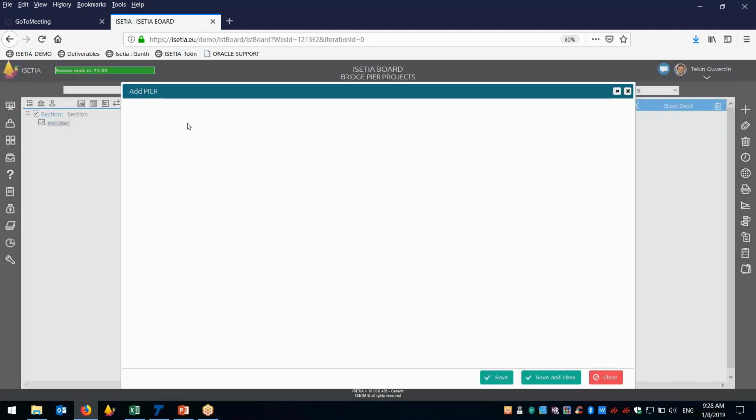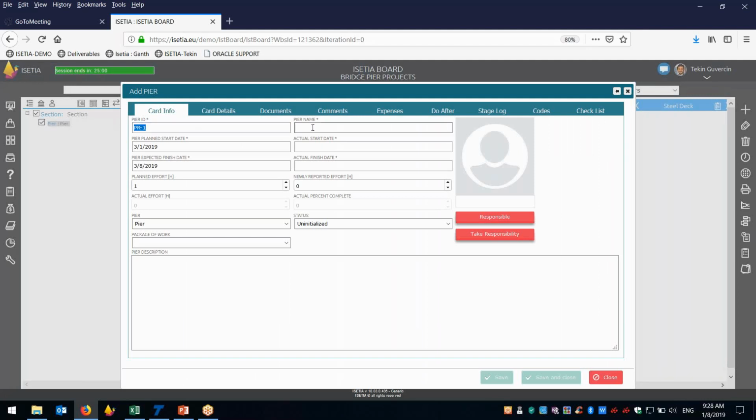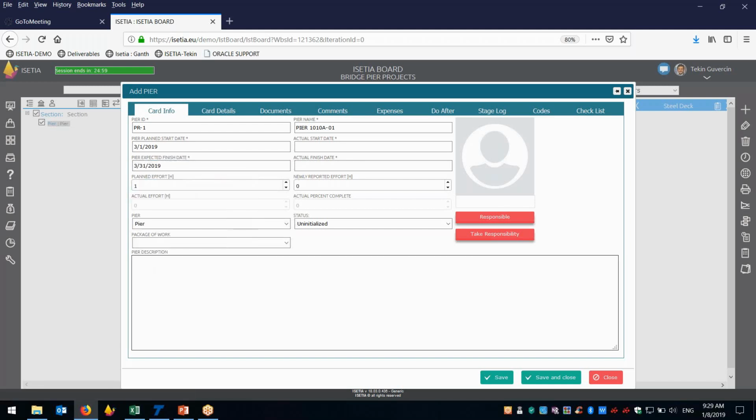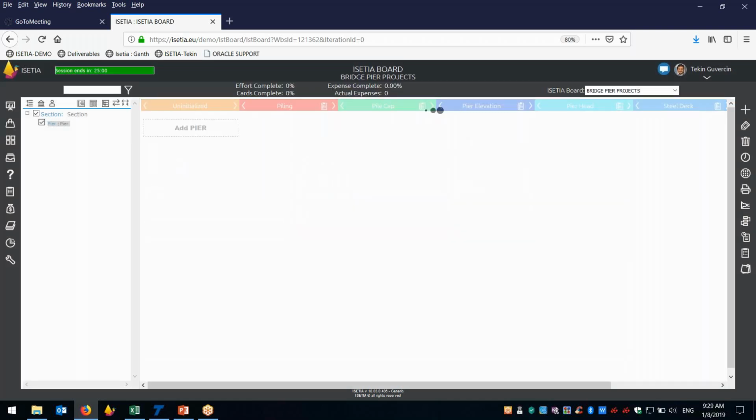You can add the pier here by adding the pier number 1, and the pier name is pier 101A, let's say 01. Planned start date and planned finish date, you can say 31st of March, we are going to finish it. And you can write in the description, this is pier construction work, which is in section 1, all right? And you can put the planned efforts, as I mentioned, 1,000 man hours, 2,000 man hours, it depends. But if you don't want to use it, you can just say, okay, I want to save and create my cards. Okay, I created the basic data for cards, all right?